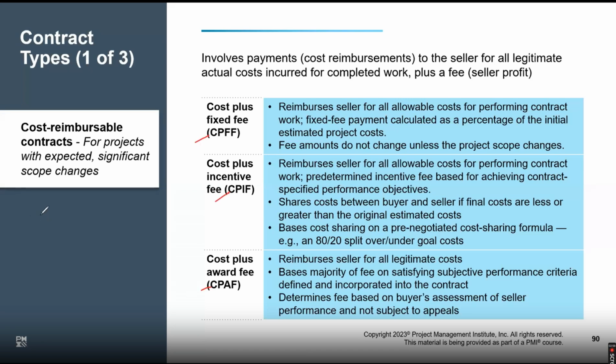What does it mean? The vendor has to pay from his or her own pocket. Whatever expenses are happening, like labor costs and material costs, the vendor will pay from their own pocket, then submit the invoices and get the money back. What is the way of getting the money back? The company could have decided different criteria. It could be like every week we do the settlement. So the vendor keeps paying everything from the pocket, and every week submits the invoices and gets the money back. This is not earning, right?